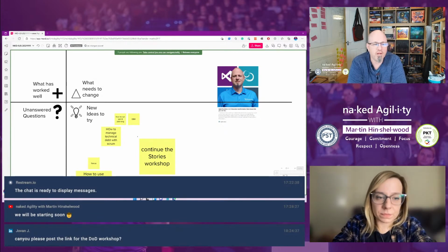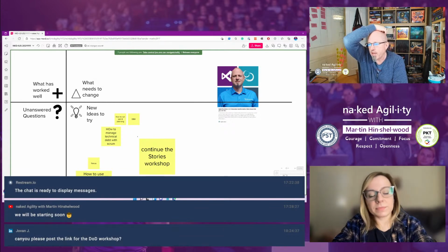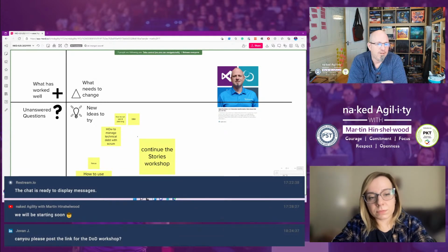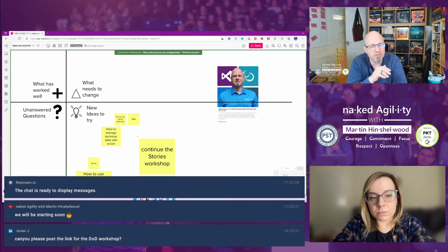Oh yeah, that's okay. The way I've seen it, Microsoft for a while used UserVoice, right? So not for support tickets, but for what customers would like. The customers' desires could go on UserVoice and everybody could vote on them, and then they would filter the ones they wanted to do into the system. And they have a separate support ticket system that I think probably does the same. It ends up on somebody's list and then it's approved to go into the team's backlog.